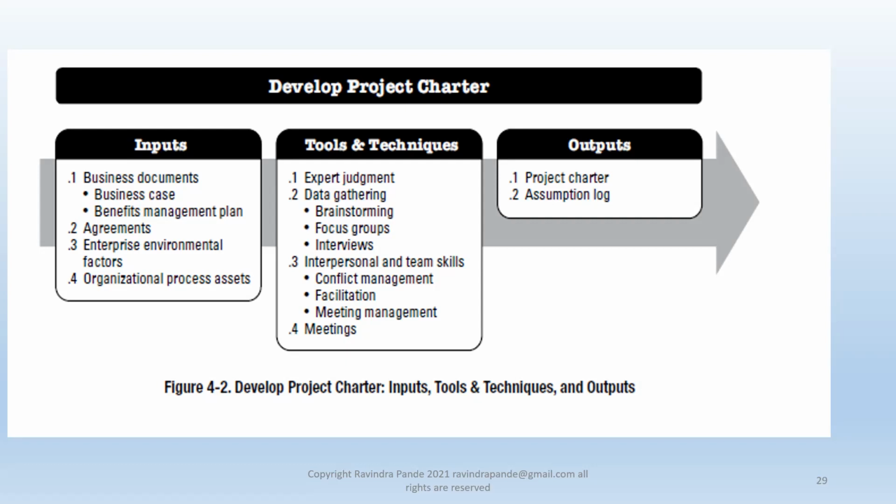Oh sorry, I forgot. Normally in many organizations, specifically Infosys, Wipro, TCS, Computer Associates, and so on, they normally have a unique ID given to your project. This is normally an alphanumeric ID which is mentioned in the project charter. So whenever you want to refer to this unique alphanumeric ID, you might refer to the project charter, because all the billings and invoicing normally happen through this unique project ID,